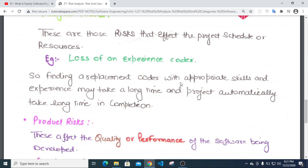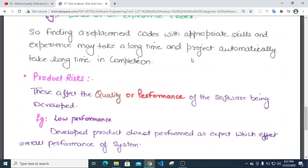Project risks are those risks that affect the project schedule or resources. For example, the loss of an experienced team member can affect the project, as that person's knowledge and code contribution cannot be easily replaced.